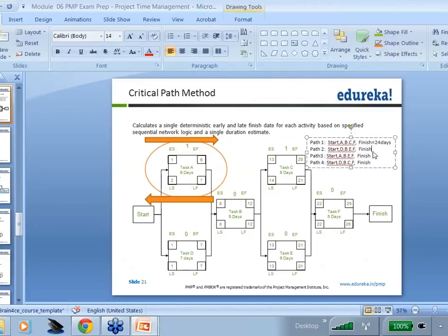That's the estimation of time for the first path. Now let us look at the paths available for activity 2, activity 3 and activity 4. Path 2 starts from D, which is 7 days, and then 5, which is task B, then E comes, 9. This is 7 plus 5 is 12, 12 plus 9 is 21, 21 and 5 is 26 days.